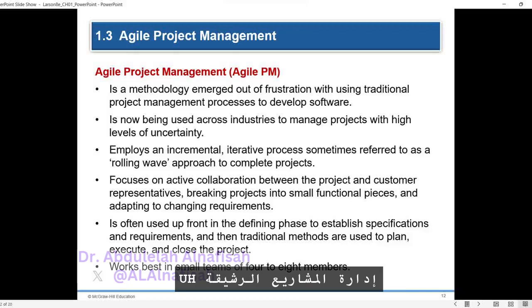Agile project management. Traditional project management approaches rely on thorough planning upfront, assuming a high level of predictability. In cases where the project scope is well established and proven technology is available, planning can be effective. For example, building a bridge follows established design principles and known technologies, allowing for effective planning. However, many projects face uncertainty when the scope or technology is not fully known.